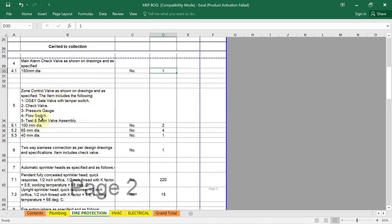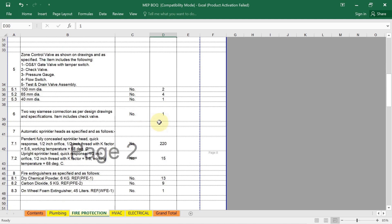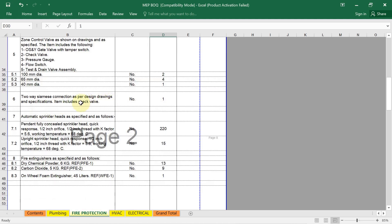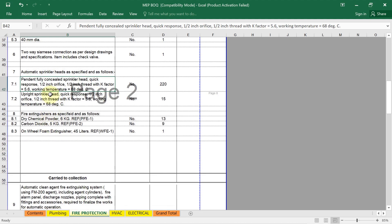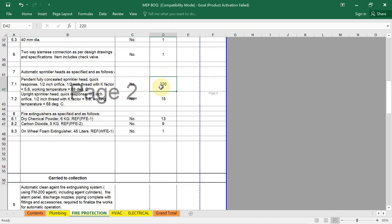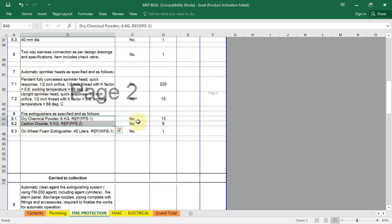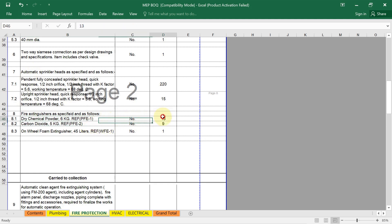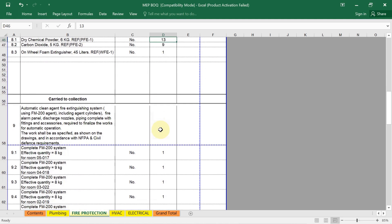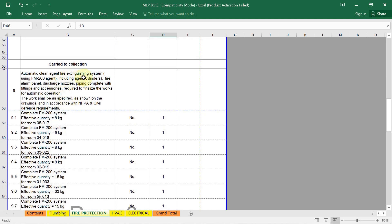Zone control valve is the combination of OS and Y gate valve. Their quantity, 100mm diameter, their quantity is needed here. Same way, Siamese connection, if you are using automatic sprinkler head detail. See which type of sprinkler you are using in your project, pendant or upright sprinkler. As per that, their quantity. For that, first you have to calculate the material, you have to prepare the material takeoff quantity for all this. Fire extinguisher, the different types, which type of fire extinguisher you are using in description, write down and their quantity. Same way, clean agent fire extinguisher, automatic clean layer. For example, FM 200 agent, if you are using, their detail is given.